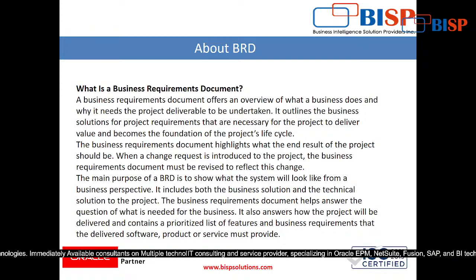After completion, in a document, first we will write what they are using and how their business is going on. Second, we show how a standard process should look, and after the implementation of that complete process in Fusion, we show how your business will work in the future. Everything is done on paper only, there is nothing technical right now. In this way, we create a business requirement document.